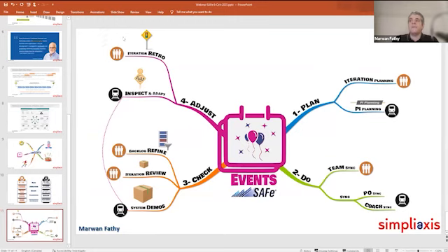The adjust on the team level, every couple of weeks, after we make our iteration review, we would sit together. It's an exclusive event only for the team members. Nobody outside the team should be invited. We talk about what did we do well, what did not go well, how can we improve what we are doing, what are the things that we are doing good and we want to keep. It's more of a reflection on our previous 2 weeks and to come up with 1, 2, 3 maximum backlog improvement items that we would focus on to improve the way we work as a team in the coming iteration.